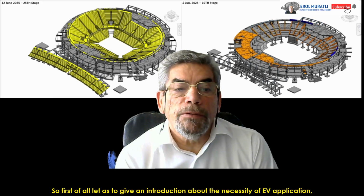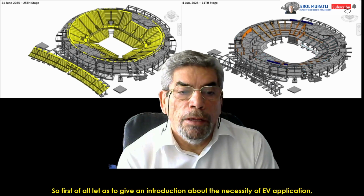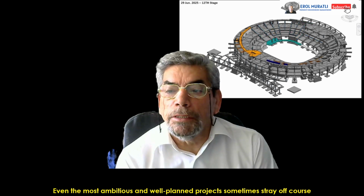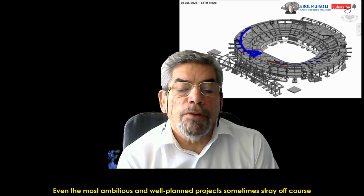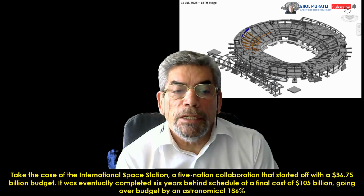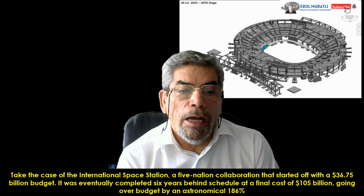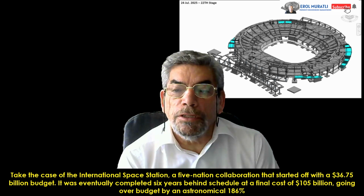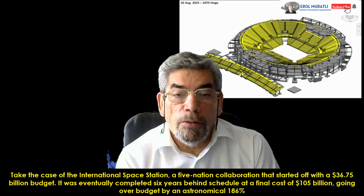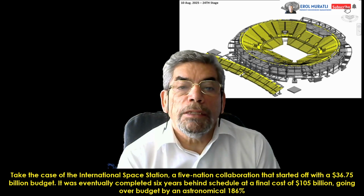So first of all, let us give an introduction about the necessity of earned value application. Even the most ambitious and well-planned projects sometimes stray off course. Take the case of the International Space Station, a five-nation collaboration that started off with a $36.75 billion budget. It was eventually completed 6 years behind schedule at a final cost of $105 billion, going over budget by an astronomical 186%.